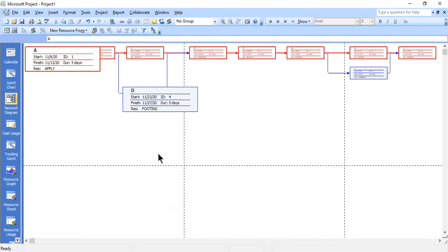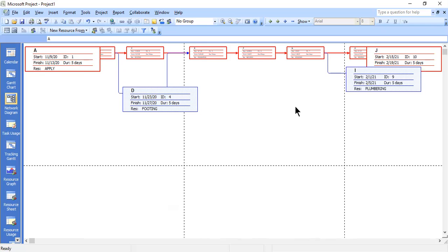That's because it has solved the critical path for me, and it has also solved which activities have float. As you can see, the critical path is the one in red. The ones in blue are the non-critical activities, which contain the float. So it becomes very easy for you to handle your projects quickly because you don't have to waste time doing these things on paper. These things take time to solve on paper.